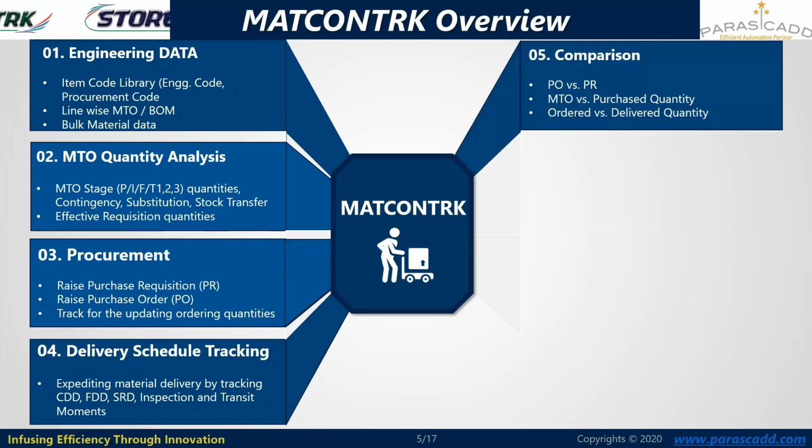Comparison: all of these inputs are available with us. Now it becomes necessary to do the comparison for tracking the quantities and measuring the supply. So PO versus the purchase request, material takeoff versus the purchased quantities, ordered versus the delivered quantities. These are the popular screens. Apart from this, the user may also customize their screen as they want and do the analysis.